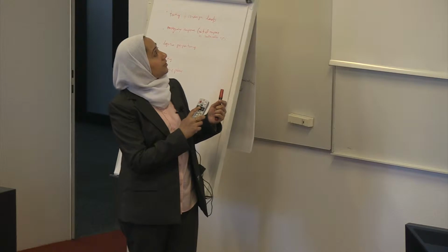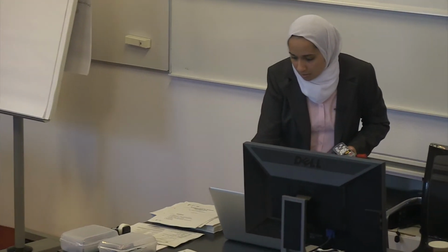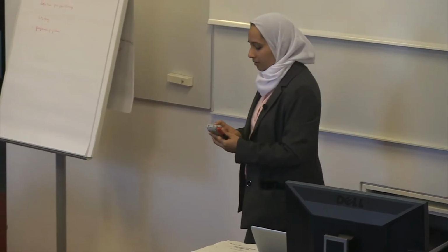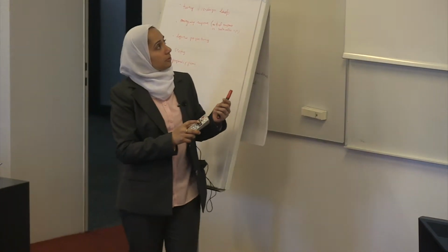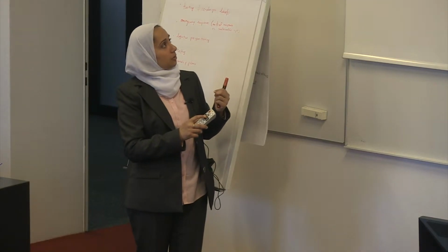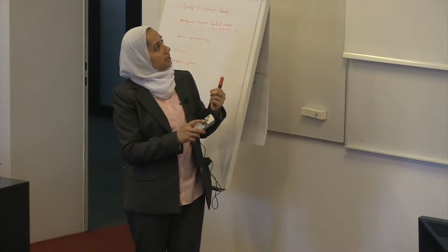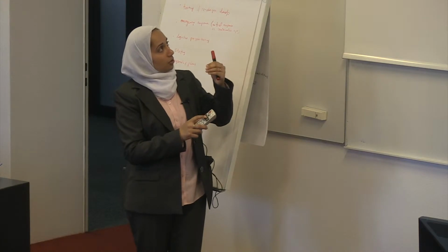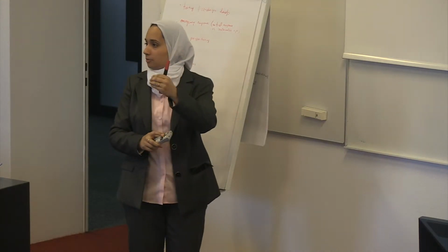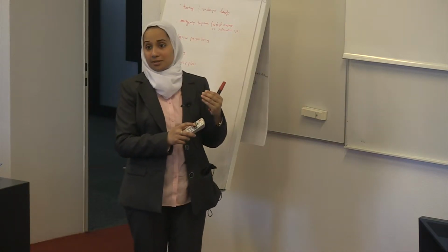So here we have task A that feeds into C, task A that feeds into B, and so forth, right? So in a matrix representation, what we would do is essentially put X's or ones. In a computer, when we're coding it, we typically put ones to represent what is connected to what. So A feeds into B and C, B feeds into D and E, right? So we essentially look down the column for each element, and that gives us what that element provides to others.